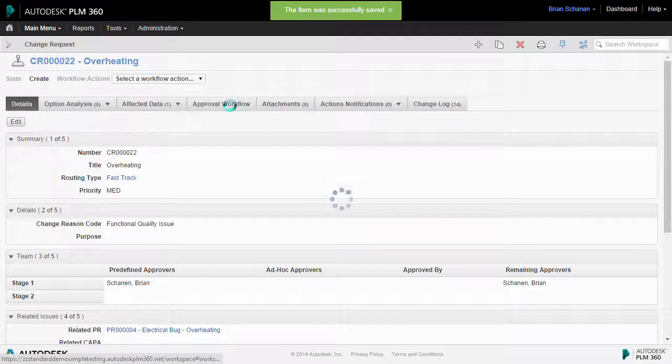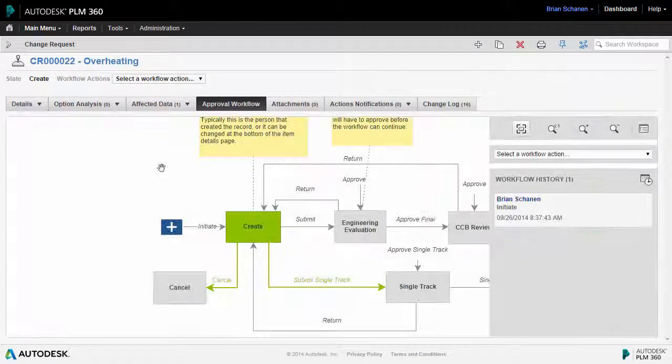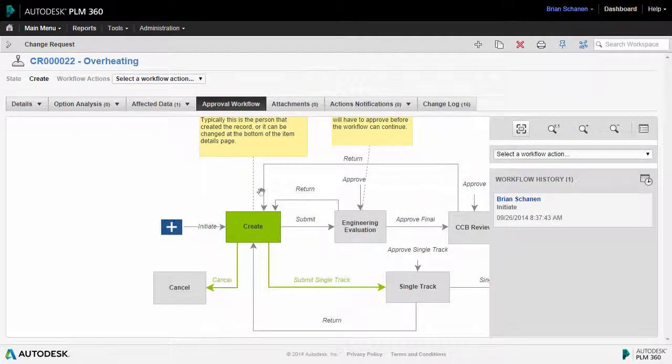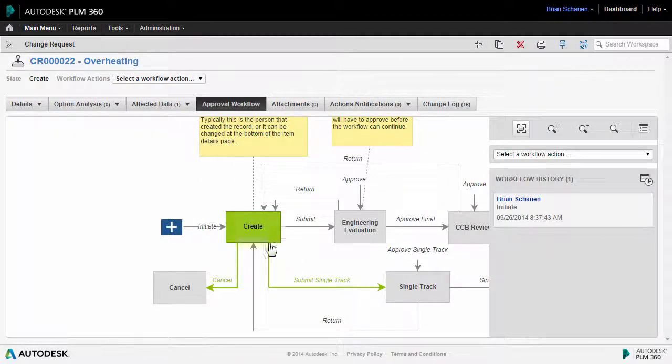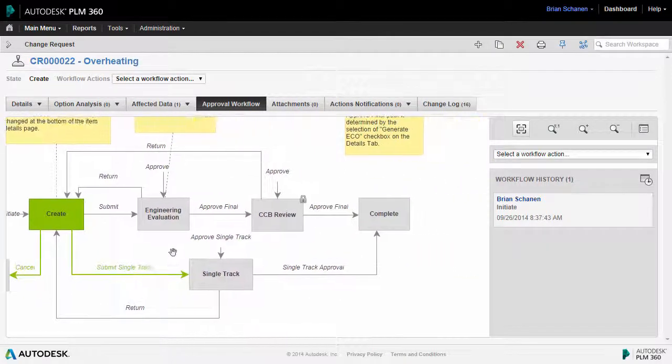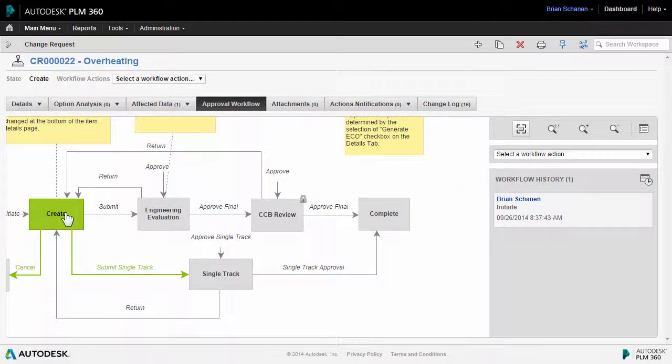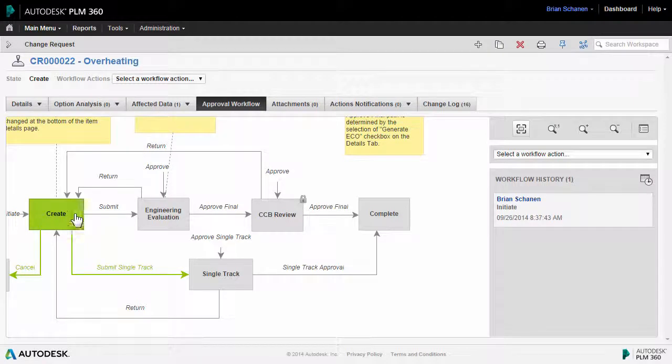More importantly, back on the approval workflow tab, the workflow routing has taken a different path. Now I have the ability to submit this via single track, also known as a fast track. So changes made in the details tab oftentimes have a direct effect on the workflow routing and the path that you can take.